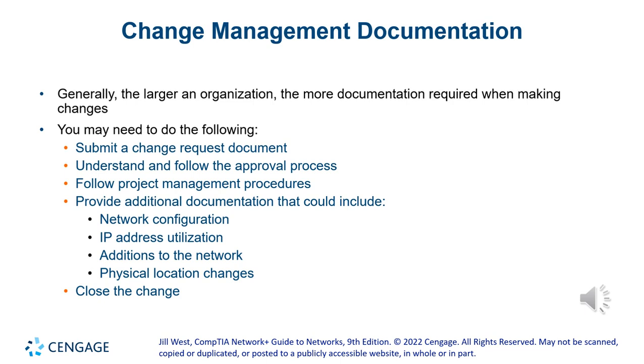I put commands exactly how they need to be typed on the command line for 2 reasons. If something happens to me, somebody can take that documentation and do it themselves. And also the day that I'm doing it, I don't have to think about it. I already thought about it many times before doing the change. I already tested it, I already did some mock testing to make sure that everything was going to work. So the day that I'm doing the upgrade, all I'm doing is following my own documentation and saying, okay, do this and do this, and it goes a lot quicker, and I know for sure that things are going to work. You still have to be careful. Something you might skip here and there, but 90% of the time, everything is documented correctly. Like I said, and it's all approved.